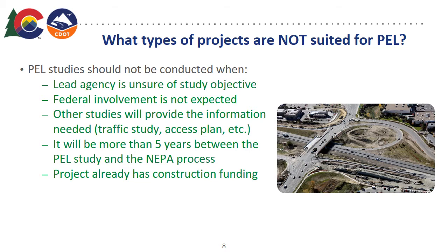A PEL study shouldn't be conducted if you're unsure of the study objective or of federal involvement or authority in NEPA assignment states. Agencies may wish to and are encouraged to conduct good planning studies, but if FHWA is not involved, they don't need to follow the PEL process guidance.